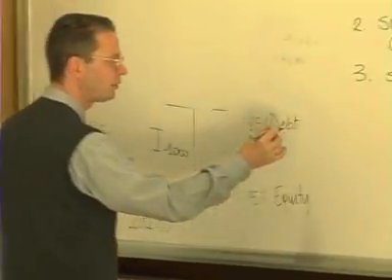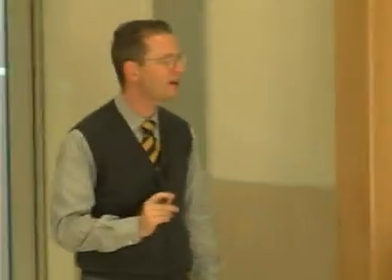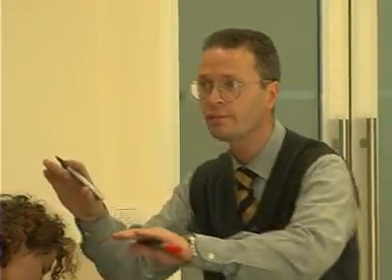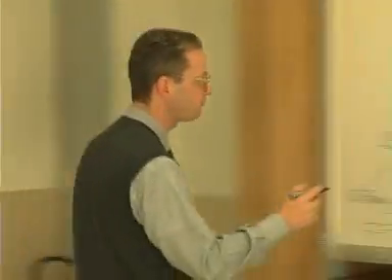Suppose, for example, you remember a change in law. There is a change in regulation. You have to make some changes in the original design of the project, and so you have to spend much more money. Okay? Suppose then that, for example, banks agree to provide you what I call a standby loan or standby facility. I mean a loan that is in standby, it is waiting until there is some form of unexpected event to be covered. If that unexpected event doesn't occur, the standby facility will never be used. Very simple.